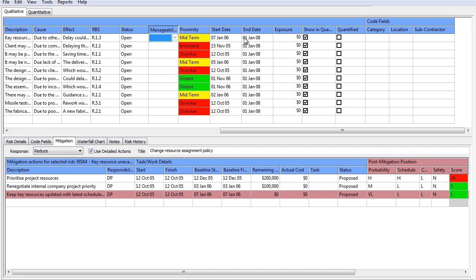Now, that's the risk window when it can occur. We're going to actually take and link these risks into the schedule risk analysis. So we're going to link them to an activity. So they're going to occur based on the logic in the network. But if it's a winter risk, it shouldn't be. If the activity pushes that risk period into summer, it shouldn't be able to happen then, etc.